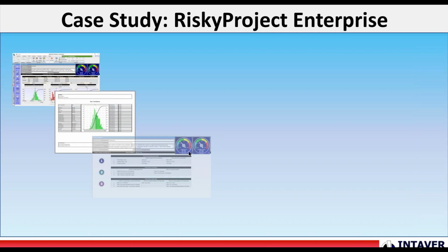So for reporting, I've just included this for quantitative. They're doing a very simple one. Again, they're not doing it all that often. The only thing that they do seem to have liked and taken into account is the 3x3 dashboard, which gives you a quick overview of what your 3 most critical risks are for cost and schedule, and your 3 most important or crucial activities, which activities are most likely to land on the critical path or have the most impact on costs in your project plan.